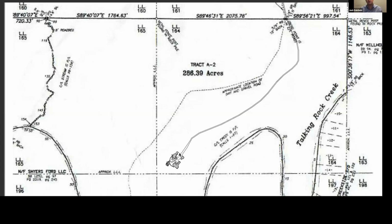So what we did was we took a plat, we took a site survey, and we started placing the home. We were able to start coming up with a plan for clearing and paving and getting construction equipment to this site. So just because we have a road up at the top right-hand corner, we still have to get access and create access. But I need to know how things are going to orient and where the client wants to sit.